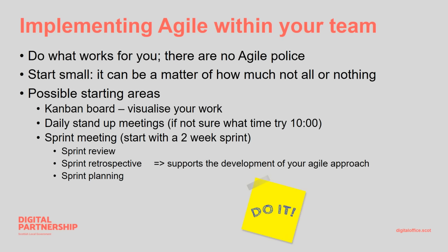Possible areas in terms of approach that I would look at is start with a Kanban board. Visualize your work, incredibly powerful tool for your team. Next, look at daily stand-up meetings. And again, very simple questions, no more than 15 minutes, and you will start to see that benefit on focus, coordination, working together within the team.